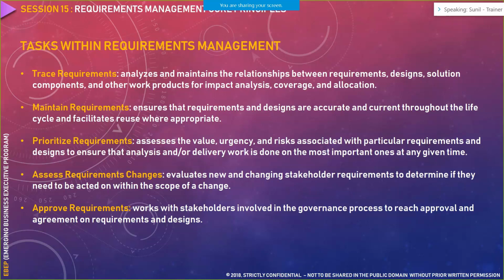Let's say you have written a requirement with an ID in the BRD, or you may write it as functional requirement FR-001. That is a textual requirement. When you elaborate that particular textual requirement, you would come up with various design artifacts like a UI screen, and you would name that UI screen UI-001. You would create a UML use case, and you would name that UC-001. So all this, FR-001, UI-001, UC-001, should serve as a single requirement.